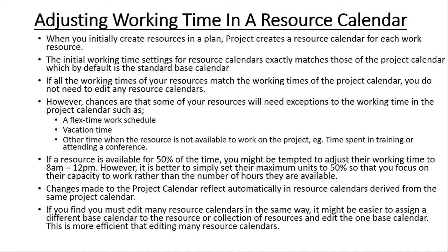So whether it's a person or whether it's a machine, all it does is duplicate that standard calendar and makes a copy for every work resource. So initially, the working time settings of the resource calendars will exactly match those on the project calendar, which, like we said, the default is the standard base calendar.